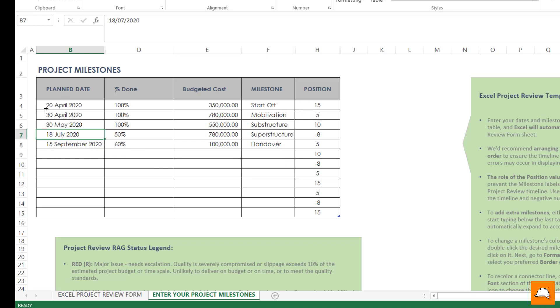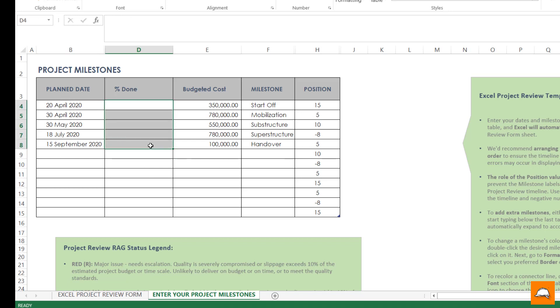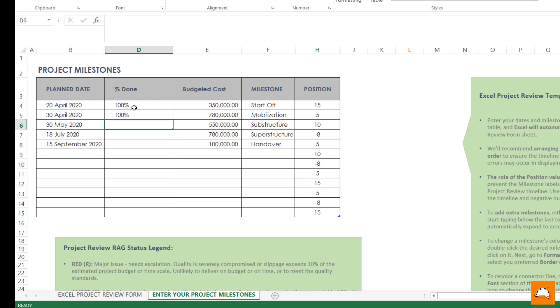And enter the completion percentage that's in the beginning. Start off as 100% completed, mobilization goes 100% completed, substructures fully completed. So you put whatever the percentage that's actually there.